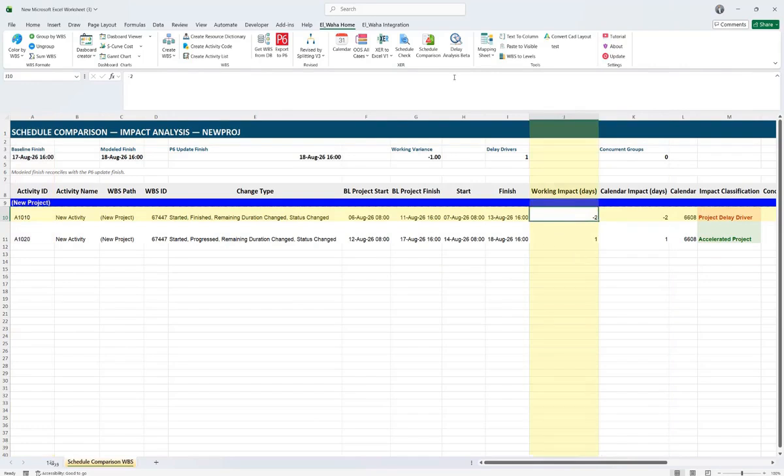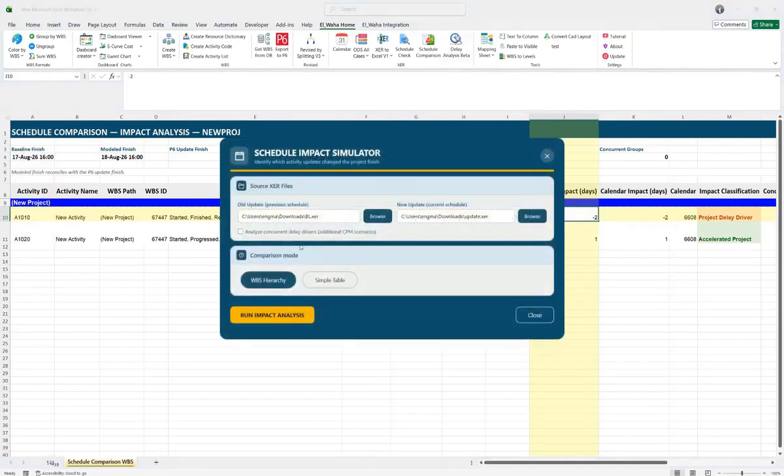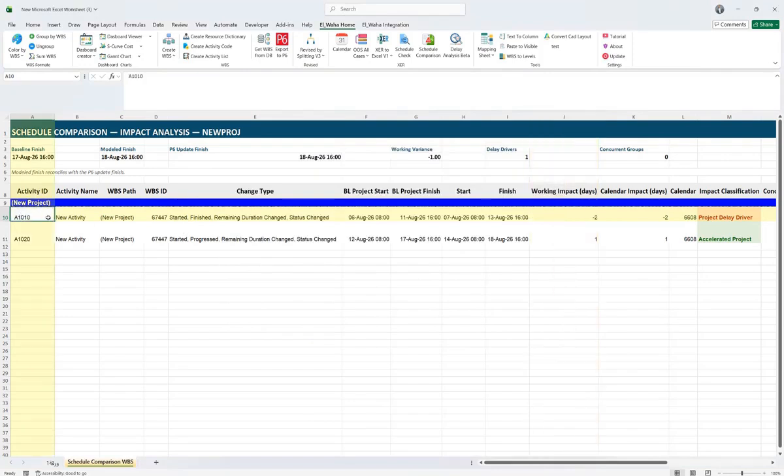If you check this tool, if you don't check it, it will only bring you one activity from the concurrent activities. If you check it, it will bring you all the concurrent activities. What are the activities that were in the same period as this activity and delayed or caused a delay to the project, whether by 2 days or less? Anyway, there was an overlap period between these things, and it will show it to you.